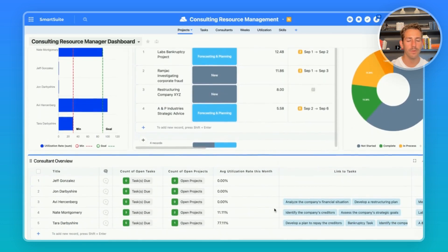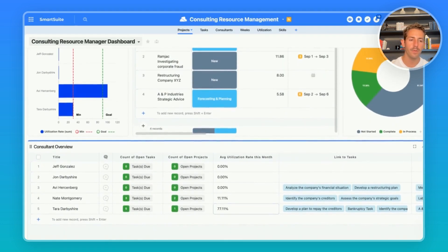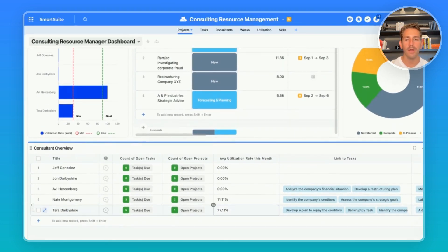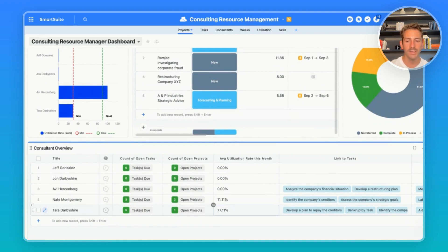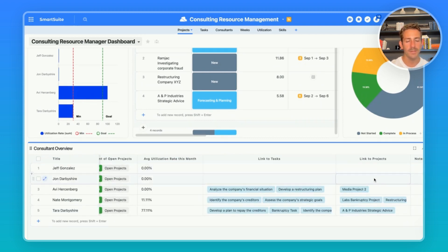Continuing in our dashboard, we have a consultant overview which is showing our listing available resources including how many projects and tasks each of them are working on currently. From this view, we're able to easily identify who is on the bench and who needs to be assigned work.